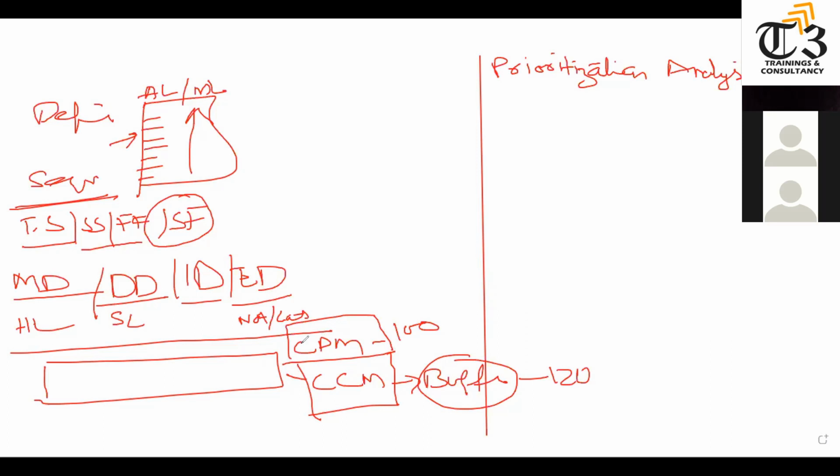When you are doing the sequence diagram, you have to know about the dependencies, and you also know about the float. What is float? The amount of time an activity can be delayed without delaying the project end. And we have two types: total float and free float. Total float: any activity can be delayed without delaying the project end date. We call it shareable float also.